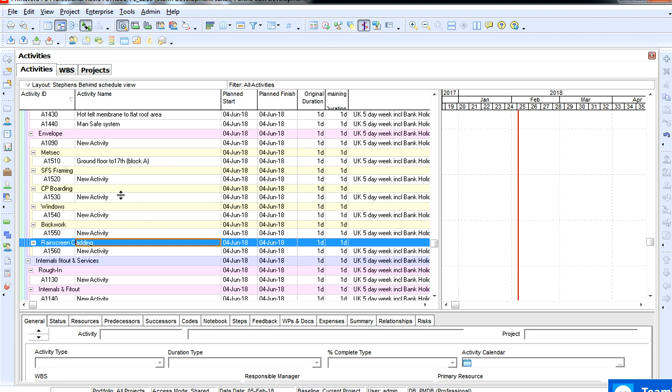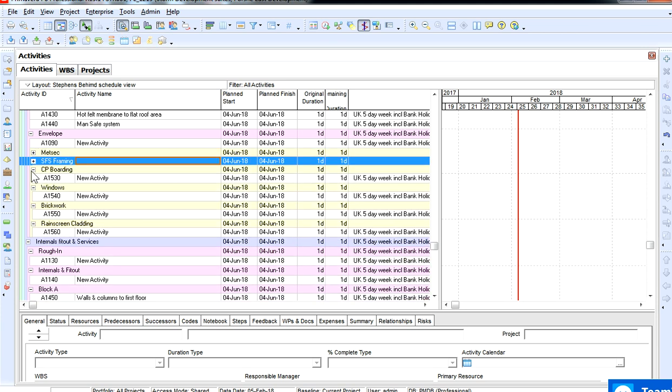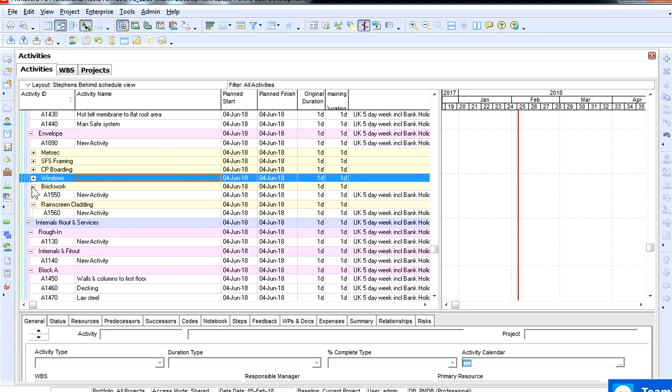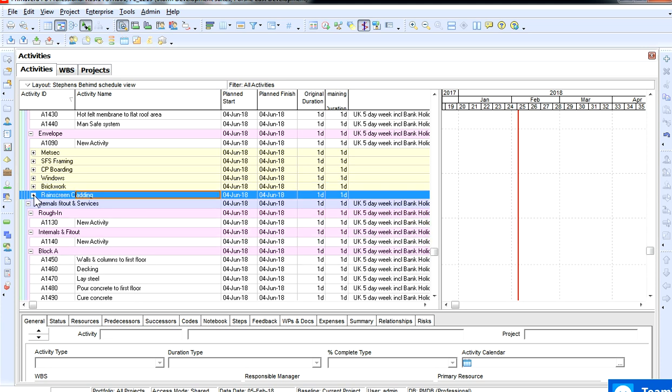And what you would usually do is, if you haven't got the sequence of work and you've got a PM, you'd sit with them and ask them what are the elements of work that are required, obviously, to be carried out. For this, obviously, it'd be easier because we've got the envelope. So you just make sure that they're high-level activities because you have got 17 floors for block A, B, C, etc. Okay, so as I said, this part of the envelope, you would have to create a WBS specifically that would have these as the sub WBS.